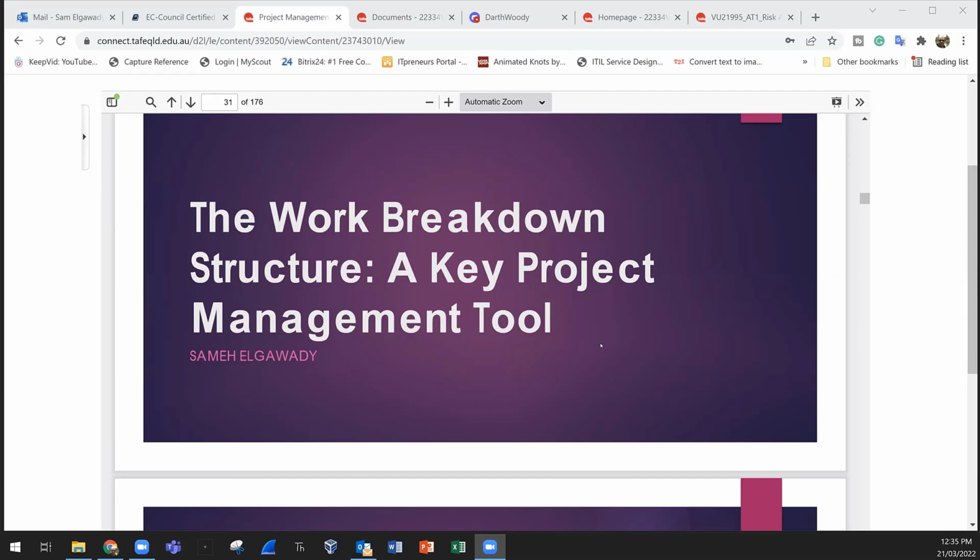So for my house, I need a carpenter. So I will decompose the big project, which is the house, into smaller parts. Smaller parts, let's say, for example, we have doors, kitchen, laundry area. So I need a carpenter to do that. So I'll take this part and assign this one to carpentry. Could be one person or one team.